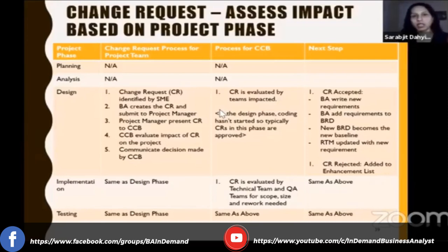So if our developers have spent 1 or 2 weeks creating something and it's not what the business needed, we only lost those 2 weeks, as opposed to Waterfall, where if changes come in when we're testing, which is the first time we get to see stuff, we may have wasted 4 or 5 months of everybody's time, right?